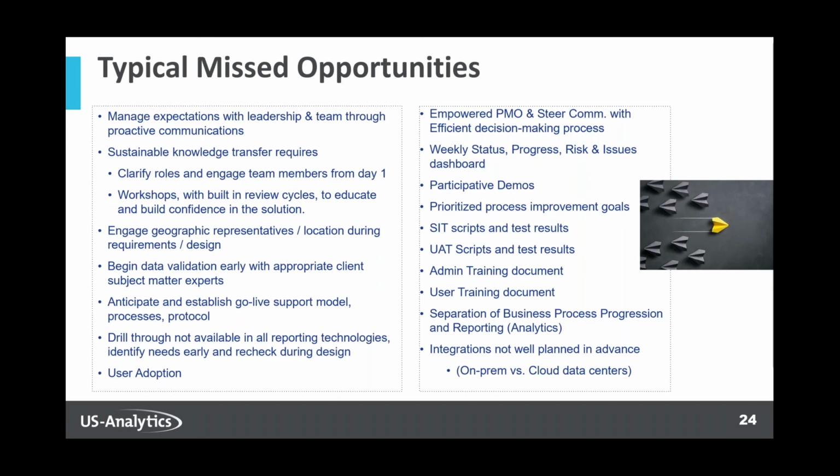You want to do that data validation early. I mentioned before how bringing reporting up at the beginning of the project really helped from a testing and a validation perspective, but don't leave it as an afterthought to the end. A lot of these technologies will provide drill through, but the way you do your integrations matters in order to have that drill down. So if you want to use enterprise data management or FDMEE to do those integrations, in order to provide the drill down capability, you need to understand that up front, versus maybe just using a generic ETL tool to mass move data into another system where you're not going to need that drill down capability, those kinds of aspects.